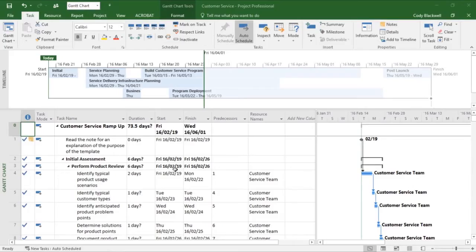If you add overtime in Project, the resource's total work on the task will remain the same. When you enter overtime, the number of hours will be scheduled as overtime. The same amount of work will be performed, but in a shorter time span.